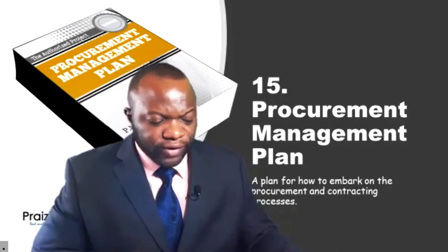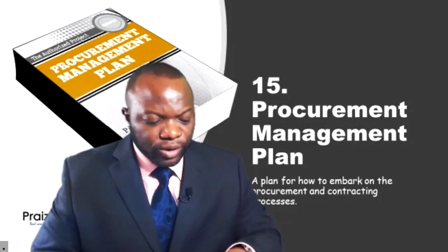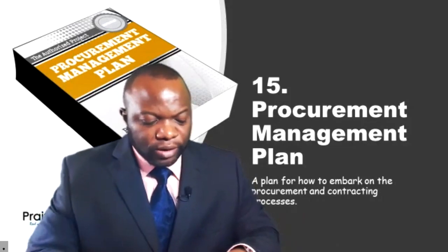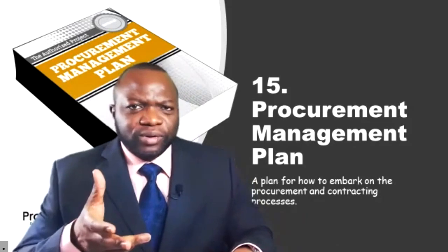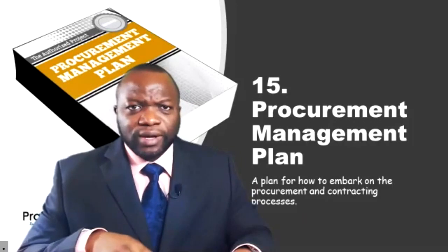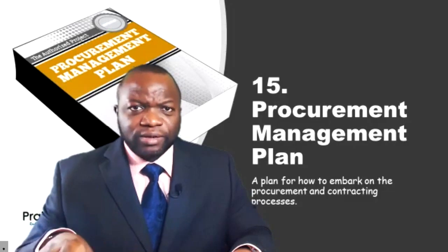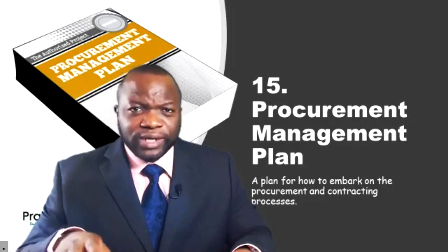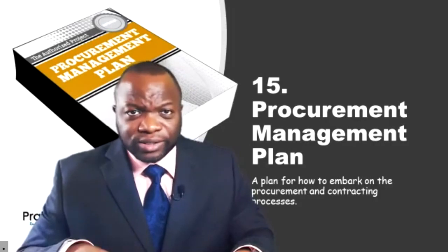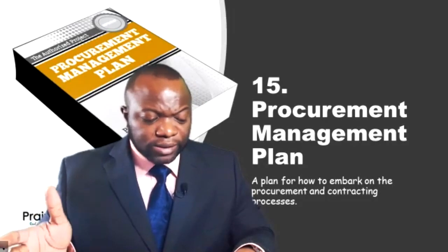Page 475, it says, the procurement management plan contains the activities to be undertaken during the procurement process. It should document whether international competitive bidding, national competitive bidding, local bidding, and so on should be done. Take, for example, a company that was ignorant about procurement and how it should work in a particular geographic location and ended up employing the wrong demographic. They got penalized for not following the regulatory proceedings for procurement in that area. They awarded the contract to the wrong entity by way of qualifications. So this is something that could make or break a brand, harm reputation.